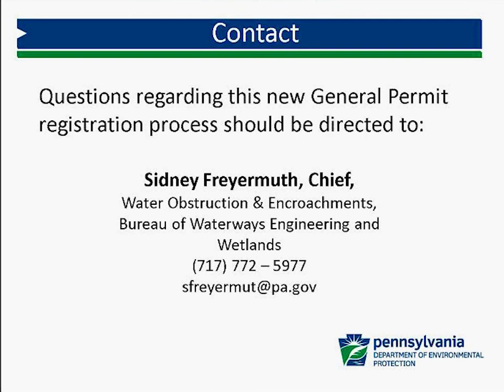On the new Aquatic Resource Impact Table, the impact is listed for stream, floodway, and wetland. How would we now report impact for wetlands within the floodway? You would report them as wetlands. Don't report them as both.